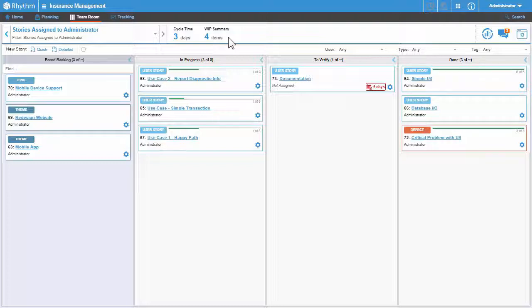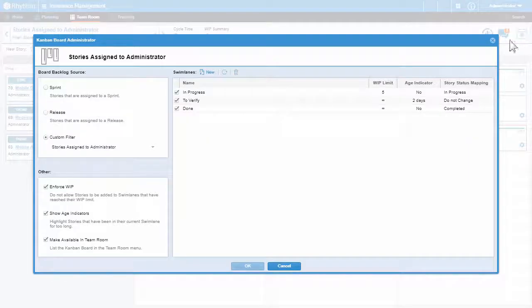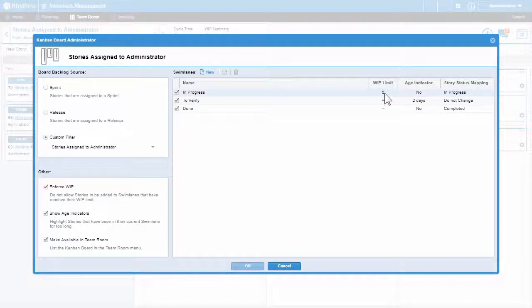Earlier in the course we set the WIP limit for the in progress lane to 5 stories. I'm going to change that to 3 stories using the Administration tool.